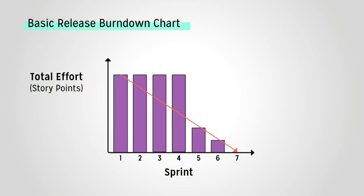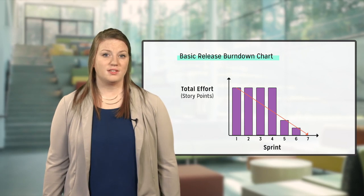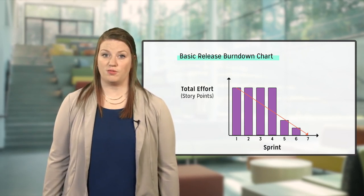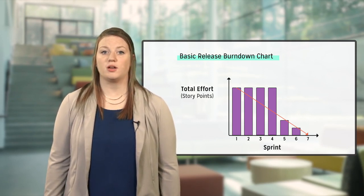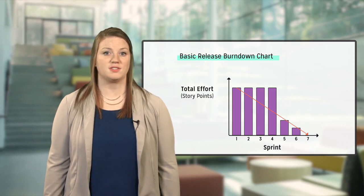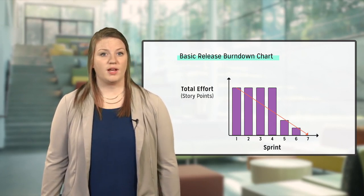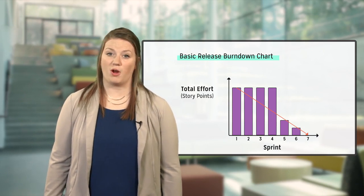Our burndown chart ended up looking like it showed we did nothing for 3 sprints, and then worked really hard in sprint 4. We knew that wasn't the case, but a burndown chart will show if your team is working towards completing features entirely before moving on to new ones. Otherwise, a burndown chart is not a good representation of a product's progress.